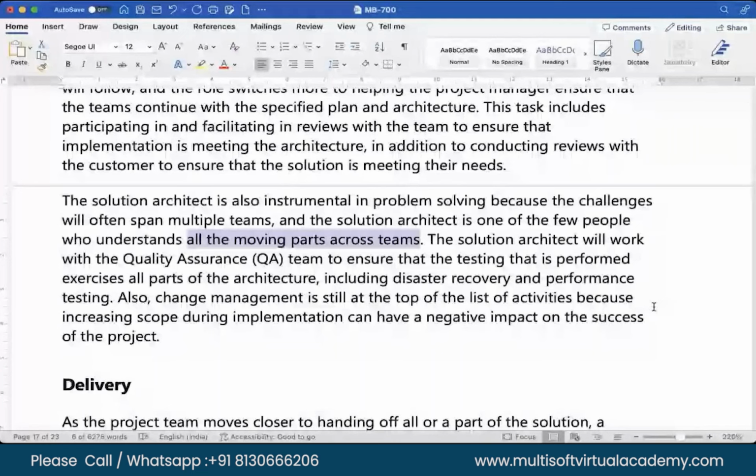I had a similar problem myself. One of my developers was doing development on one particular module, and similarly one of my functional consultants had a requirement to make a field mandatory. They changed the configuration part and said, okay, my problem is solved, but the developer was developing something on the same module, and now his delivery was not working.